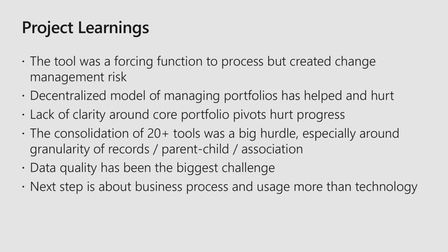The decentralized model for managing portfolios was useful. It hurt us and it helped us. It helped us in the sense that we could bring in modules or areas of the business over time as opposed to doing a lift and shift. But it also meant that the first guys that came over tended to set the rules, and the guys that came over at the end tended to suffer. That was the hurt part.